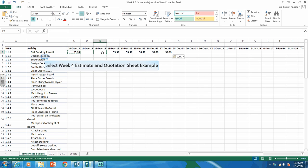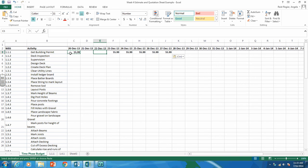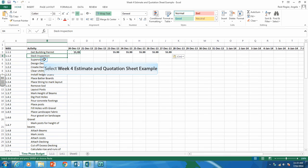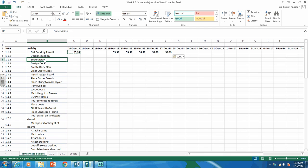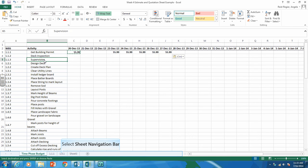So that's the get building permits. You will need to do that for each work package. And so you look at your schedule to see where it's spread over. And you'll want to make sure you're not having work happen on the weekends.